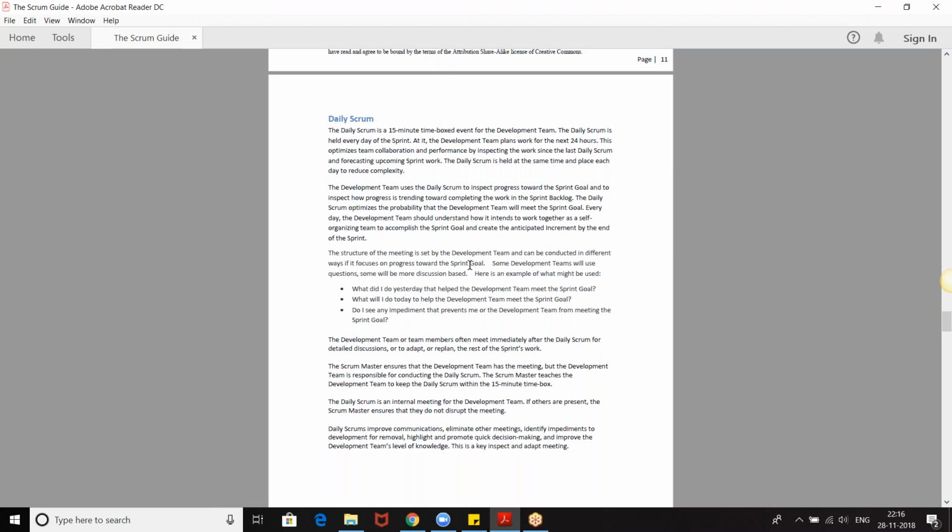So I told them, okay, no problem. Let's not have daily scrum for 3-4 days. Let us see what is happening. Okay, the team ran into a lot of trouble because they didn't understand who was at what point, who was progressing what work. For example, developer B would need something from developer A. It would have been a dependency, but they wouldn't have spoken to each other. Okay, so they wouldn't have even understood that only if developer A finishes it, developer B can pick it up.